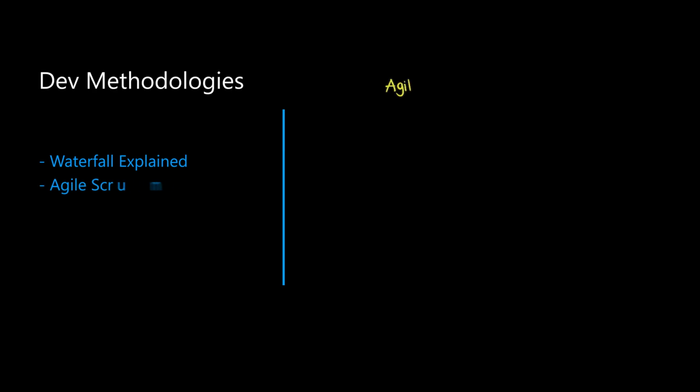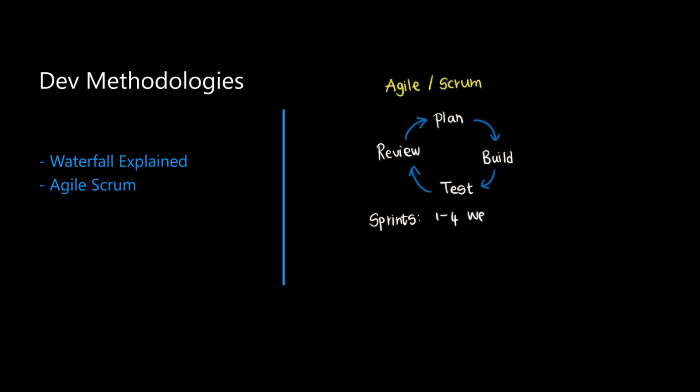Agile is the opposite philosophy. It uses short iterations called time boxes, typically 1 to 4 weeks, and produces working software at the end of each cycle. Scrum is the most common Agile variant, using sprints where a prioritized product backlog drives the work. Requirements evolve through collaboration, and teams adapt quickly to change instead of fighting it.